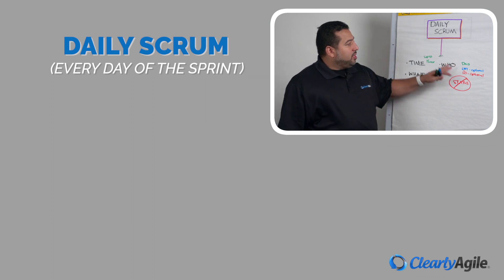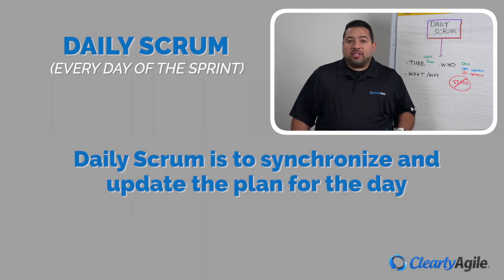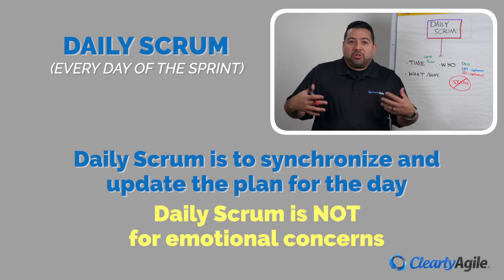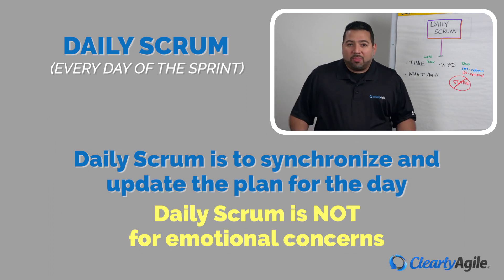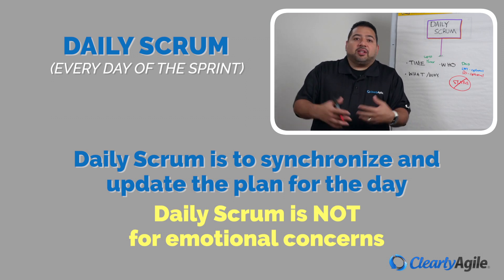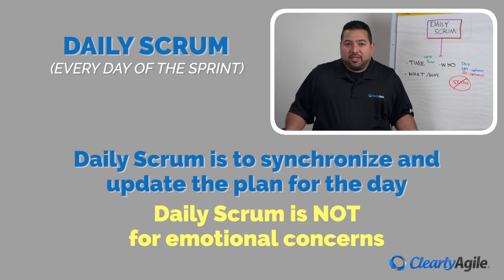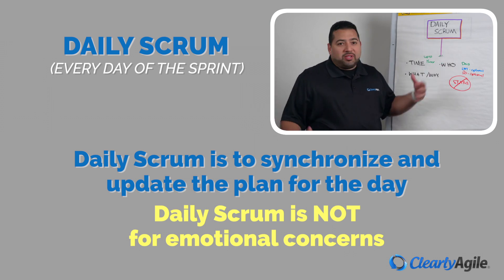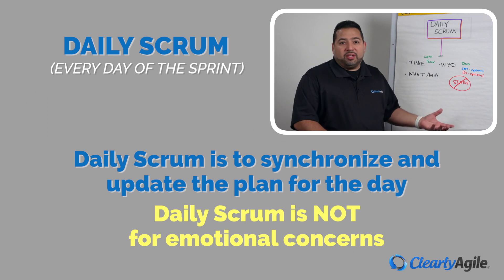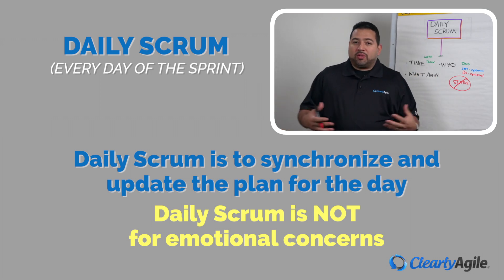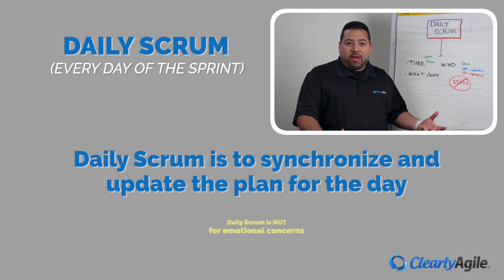One thing we need to keep in mind: the daily Scrum is simply to synchronize and update the plan for the day. It is not for emotional concerns or solving problems. For example, if Mark accidentally deleted a bunch of stuff in the database and Mary gets upset about that, the daily Scrum is not to talk about why Mark did what he did. The daily Scrum is simply for Mark to clarify: I did this, it was an accident, I'm going to need help getting it back. After the daily Scrum, Mary might work with Mark to figure out how to solve that problem.